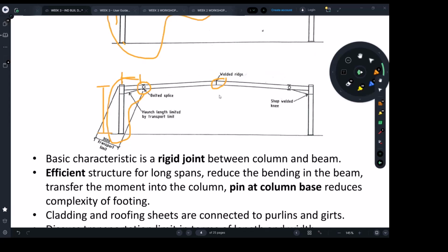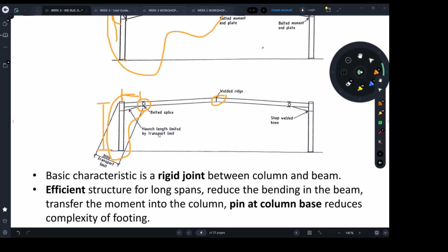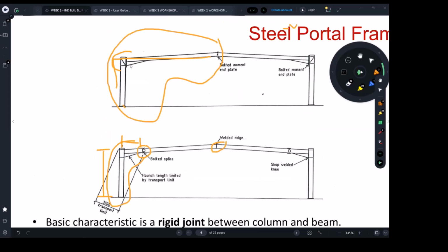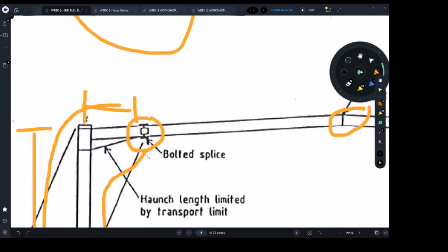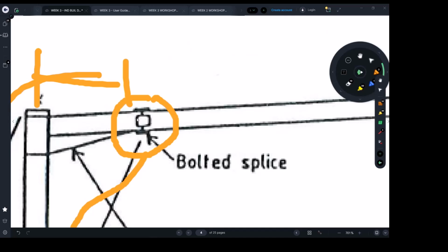But that's where, as I said, with these top-type projects, or larger or even sometimes slower ones, the construction engineers are required to be involved during the design phase, because you don't want the design engineers to design all your projects without considering this. They have to tell you how many bolts, etc. And I talked to you last week about which side to do first, whether this side, and I showed you which one is going to carry which.